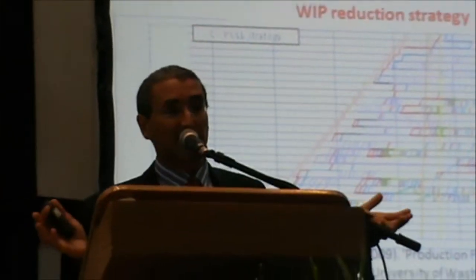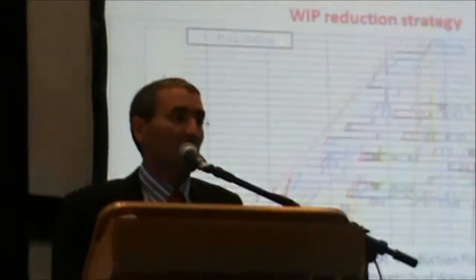But the finishing works can be, let's just say, a mess. And they can be a mess because crews can work throughout the building practically wherever they wish. And not only that, when we have clients making changes to designs, interior changes to houses, apartments, whatever, making choices about flooring, or in industrial work, suddenly realizing they need some other machine to be in that space, so let's make the floor thicker or something like that. There's noise in the process, and that interferes with the smooth flow of work.